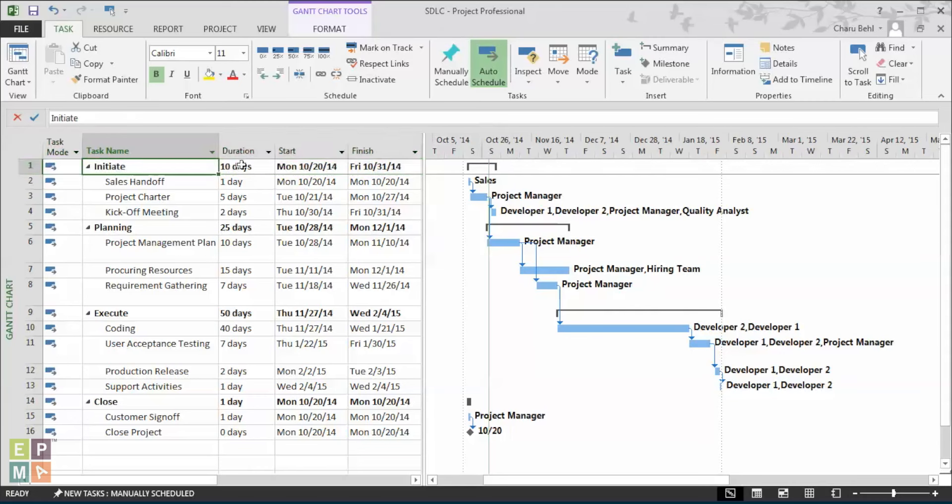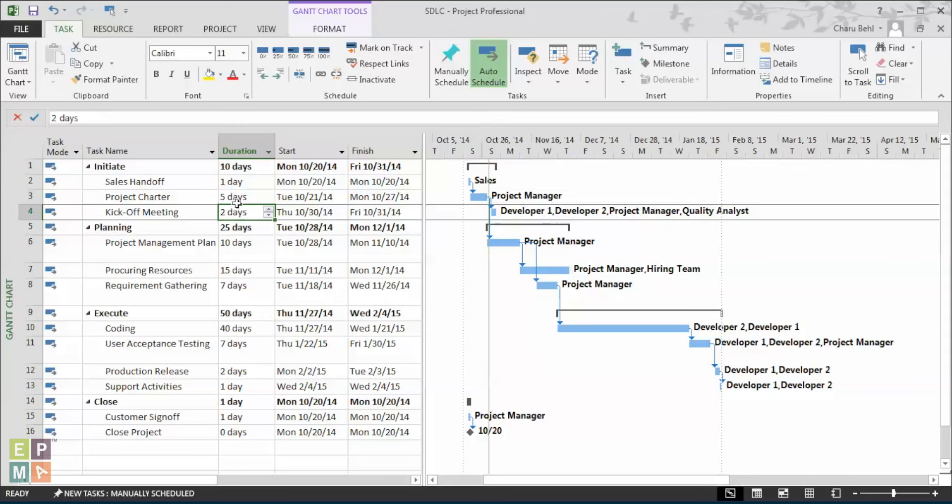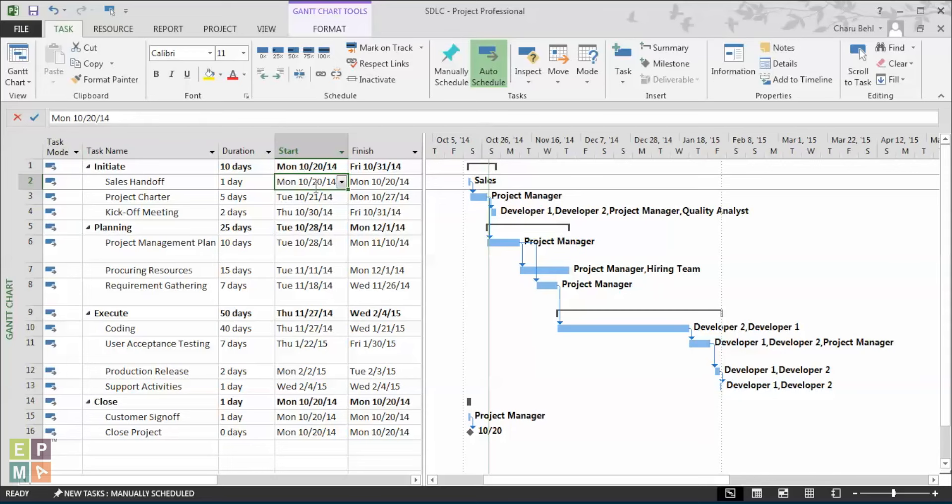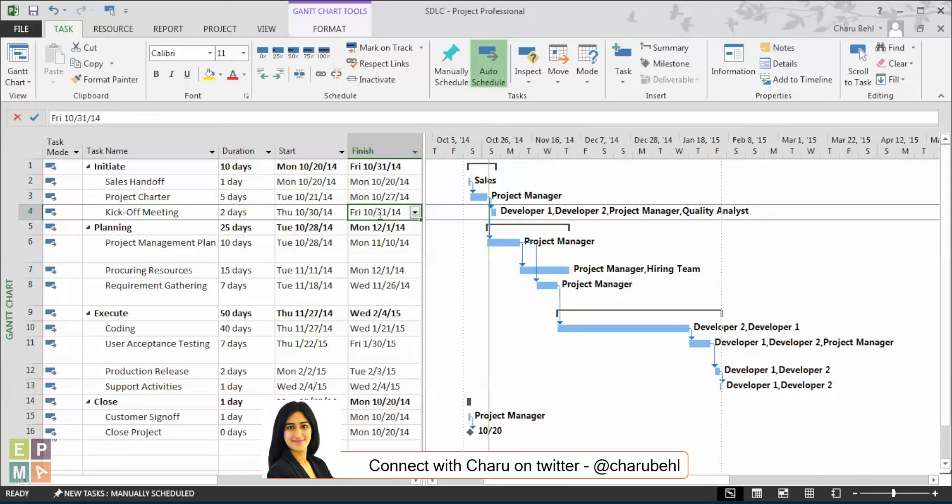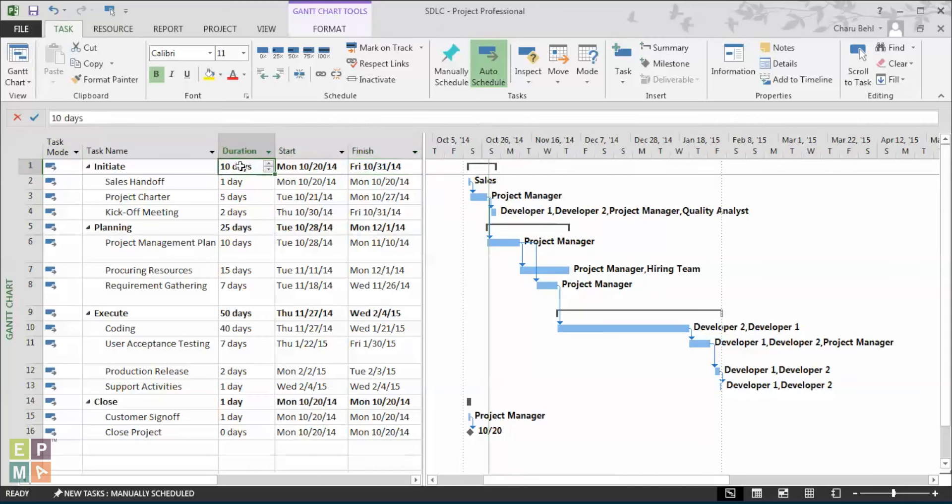Another thing that you might notice is how the duration is automatically calculated. Sometimes it might be the summation of all the sub-task durations, but how Microsoft scheduling engine calculates is it takes the earliest start date of all the sub-tasks and the latest finish date, populates it in the start and finish field, and then the difference between the start and finish date is the actual duration.